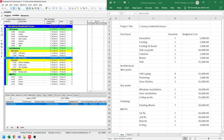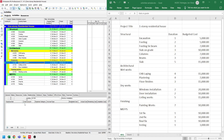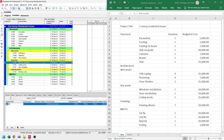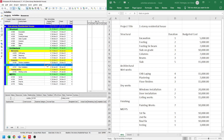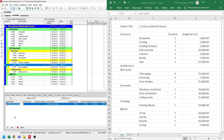Now for the window installation, let's select the activity. Let's click add. Let's type in 'window', and let's enter $20,000 from our BOQ. Now for the ceiling works, let's select the ceiling works. Let's click add on the expense item. It costs $15,000 based on our BOQ, so let's type in $15,000.